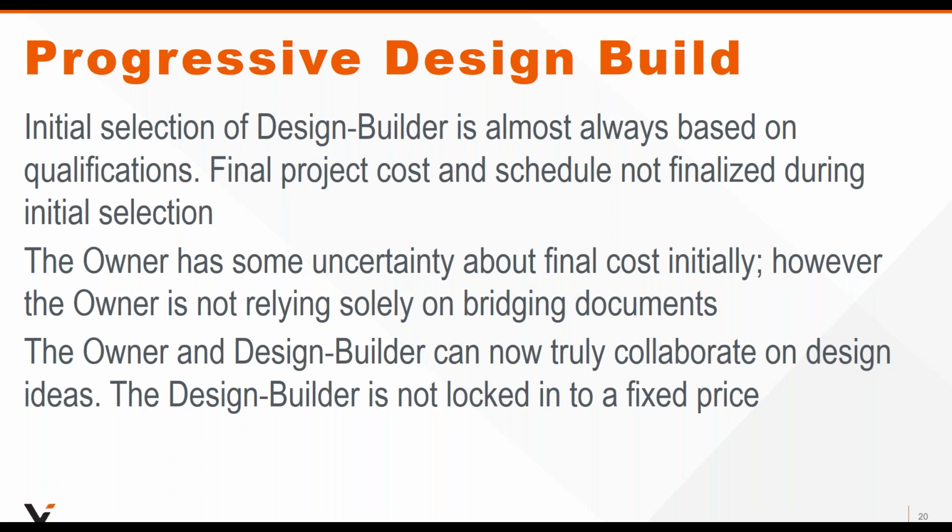So one of the unique features about progressive design build, at least as envisioned by the document drafters, is that the initial selection of the design builder is almost always based on qualification. So the owner goes out there and says, hey, we worked with this entity before. We want to, or they ask for a request for qualifications, and they select the design builder based on qualifications.